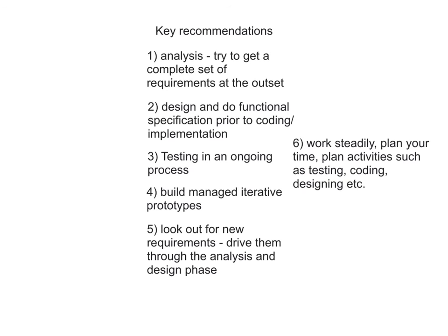And finally, 6, it's quite important that in projects that you work steadily. So that would probably mean realistically allocating a number of hours a week, possibly at the same time, so you get into a pattern. Quite a thing that will cause projects problems often is if you neglect to do something for 1 or 2 weeks on the project, because it's very hard to pick things up again. You waste a lot of time trying to remember what it was you were doing. So again, a way to aid that would be to keep logbooks and a good record.